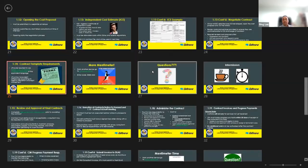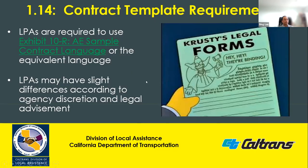For the contract agreement document itself, we have a boilerplate sample agreement in Exhibit 10R of the LAPM. The agency can use this as a reference — it contains necessary contract language items — but it will be up to the agency to produce the appropriate final contract language according to the project and work activity. We also recommend that the agency gets advisement from their legal office for the contract agreement.